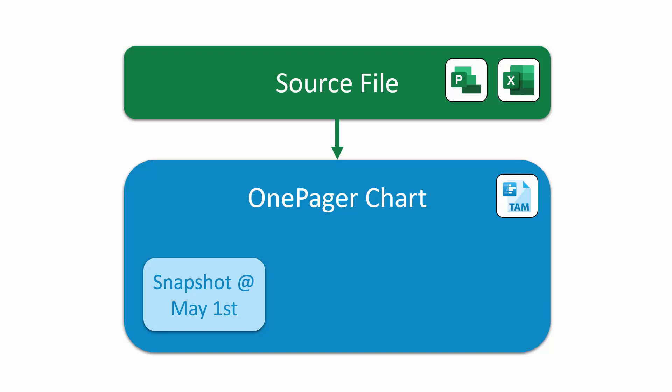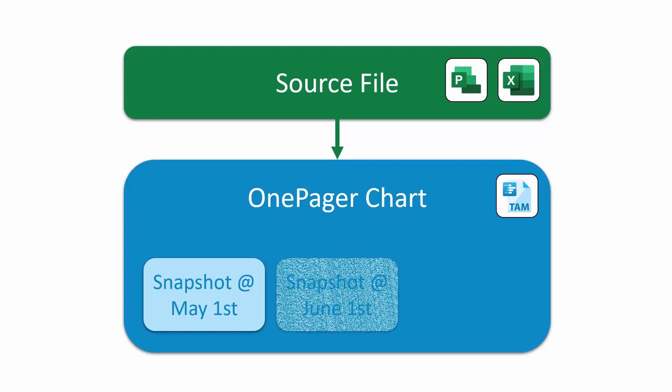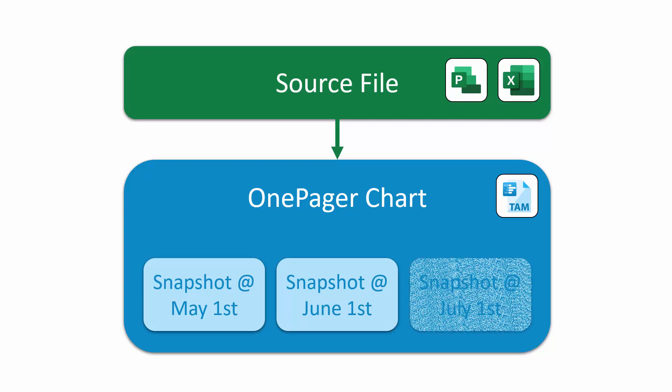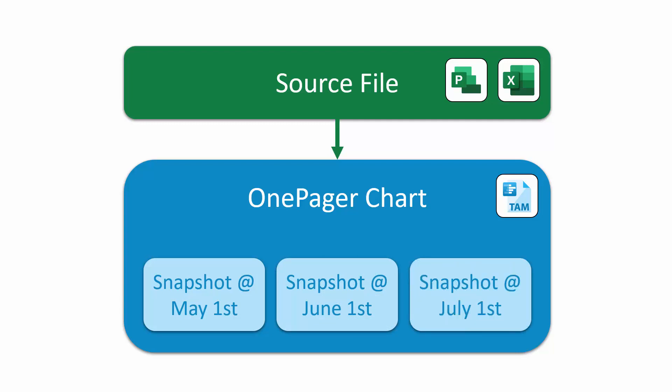Over time, as your project plan changes, you can update that same OnePager chart and simply add more snapshots to it at different dates. Here, all three snapshots live within the same OnePager chart or .tam file. This makes it easy to flip back and forth between the different snapshots in your chart and see how your project has changed from month to month.